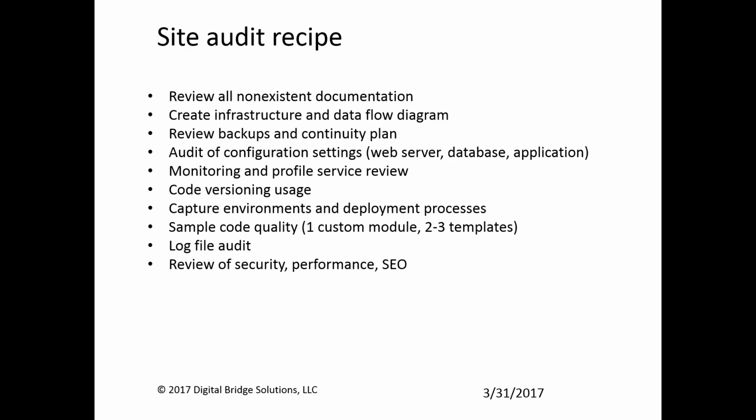One key takeaway here, and something that we always do and I feel is really important, is making sure before you start work with that client that they are protected from any unknowns: that they are taking steps to back up their database, to back up their code base, to have not only code versioning, but to make sure that their code versioning and their database backups are being stored off the server. They have some type of continuity plan. When you start to work with a site that you haven't worked with before, that is a great way to make sure that you and the client are protected from some change where the impact may not be fully realized.